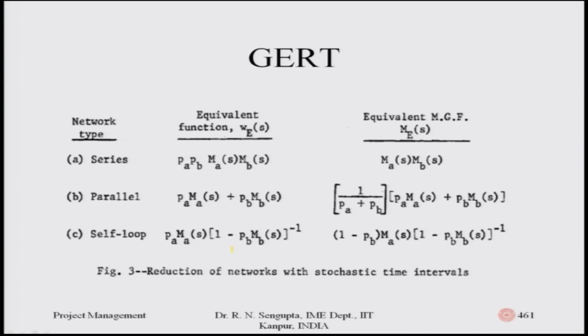Then check what the relationship of the series and the parallel is. If both of them are parallel, then again you use the parallel concept. If there is a looping, use the looping concept. If they are in series, use the series circuit and proceed accordingly.